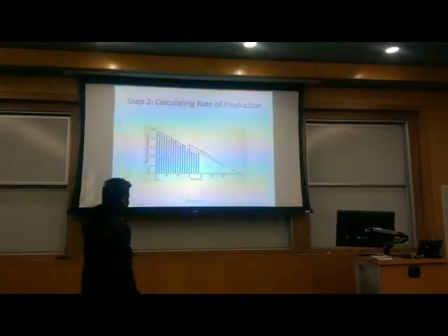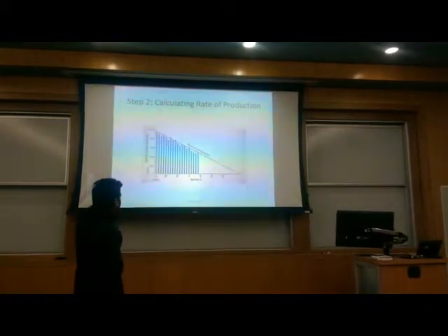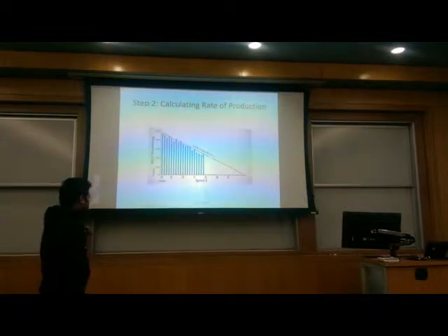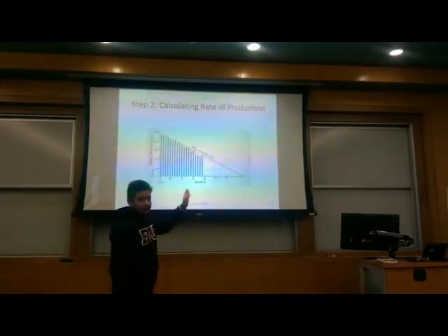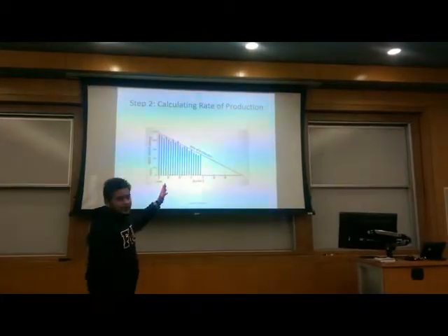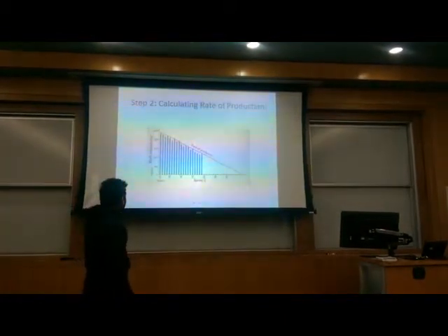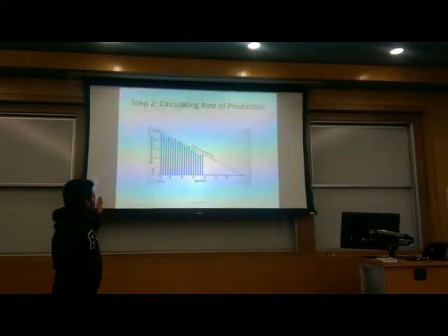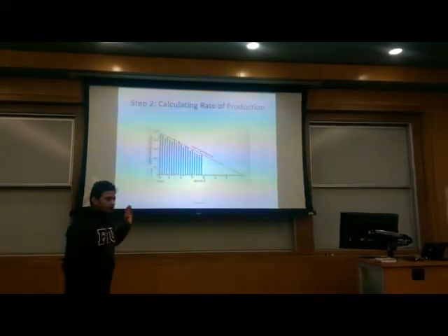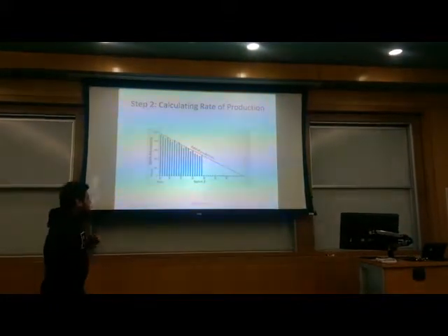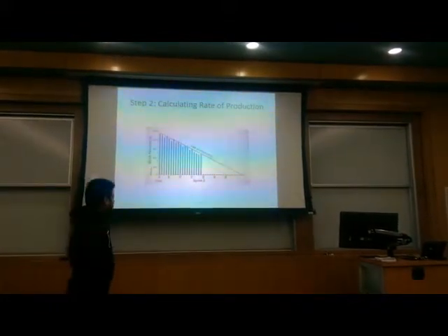This is a graph of sprint 2. As we see, the total number of hours for sprint 2 is 2000, and the days are 0 to 30. So 30 days is the maximum in which we have to complete this sprint. On the first day, as we can see, 1800 hours are remaining. That means 200 hours of work has been completed on the first day.